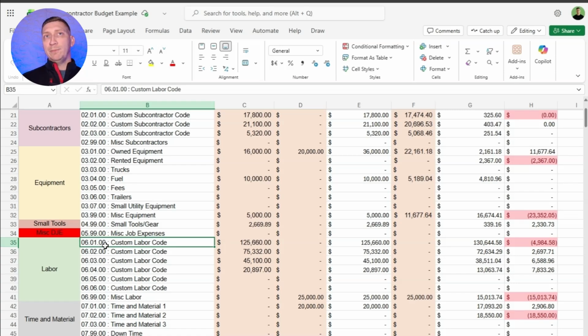I don't want my field people to sit here and think, well, I think part of it is, I think that this part at 4 foot instead of 5 foot is where the delineator is for this type of work. So half the time they're out there trying to figure out, okay, I'm digging this and I put the trench box in and I got this. That's no way to job cost. They're just going to make something up and it's going to be completely wrong. It's not going to help you at all. So if we put it in where they're doing one task for the day, it's all encompassing of this type of work. It's easy to delineate. They cost code it that way.